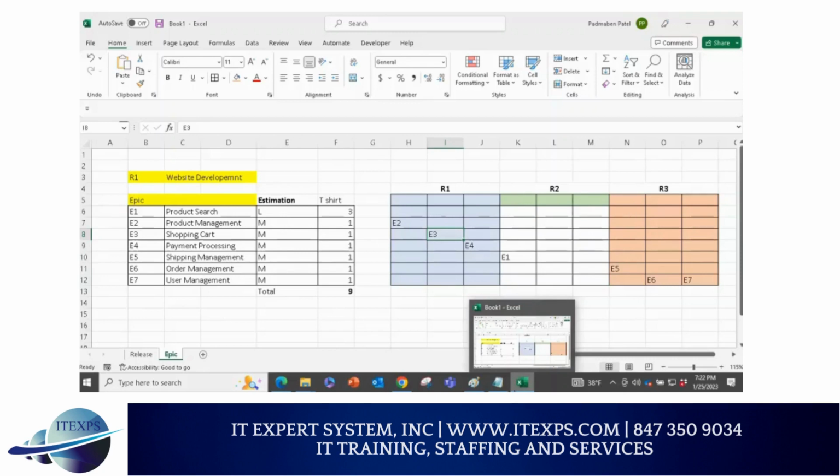So the question is, what are you going to do during that approval? Should we sit tight or should we do parallel activity? So you can find, hey, I can do this thing. And that is where we are doing product search. Here, shopping cart. But when you do product search, entire end-to-end testing you will do: search, product search, add item, view item, delete item. So that's called regression, which is complete end-to-end. But yes, you can do that part when you have time limitation. You need to be creative. In that case, certain functionality you can delay, but certain functionality you can do.